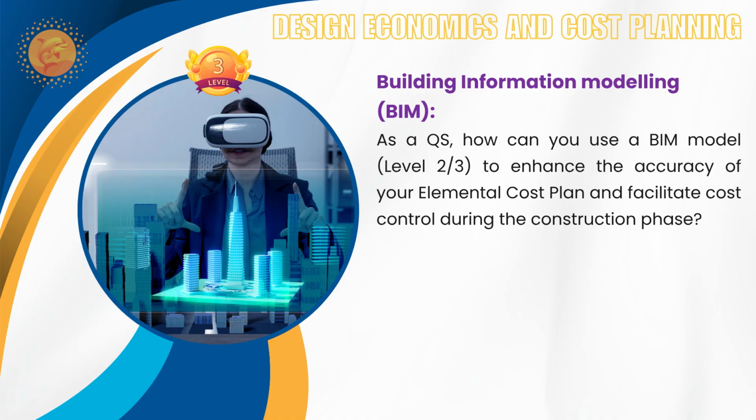So this helps you to improve the accuracy and provide the elemental cost plan, especially for complex elements, because if you have so many complex elements, manually calculating each and everything will be time-consuming. So if you have BIM, that is certainly helpful, and the 5D model can be linked to the project's work breakdown structure. You can take each deliverable element.